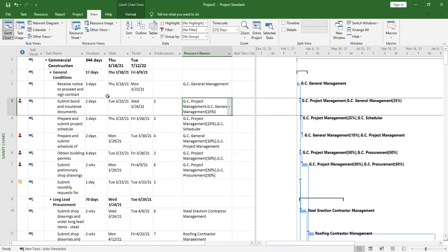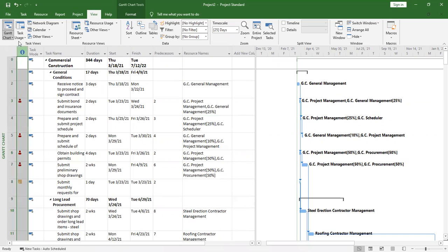So now we are asking, how do you know that you have overallocated resources or you've underutilized them? We are here on underutilization of resources. The moment you are under the Gantt chart and the entry table where you're seeing the tasks, you go to the information column and you see this symbol and the warning saying this task has overallocated resources.